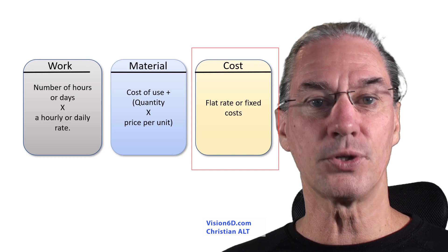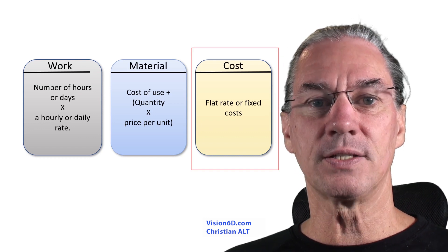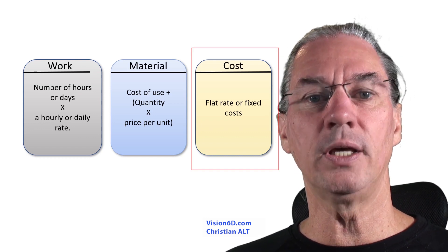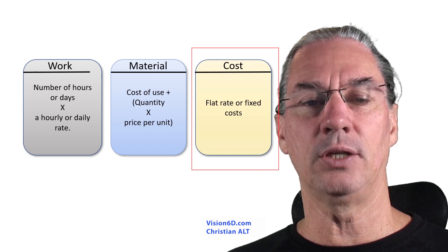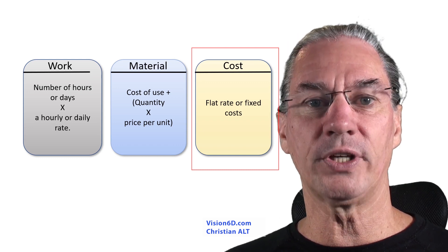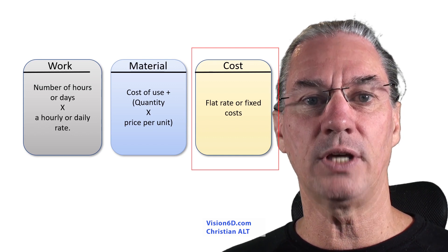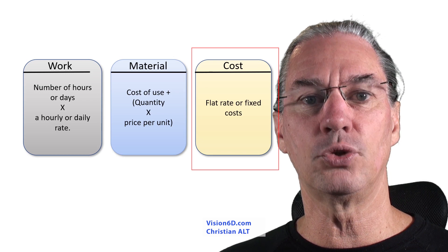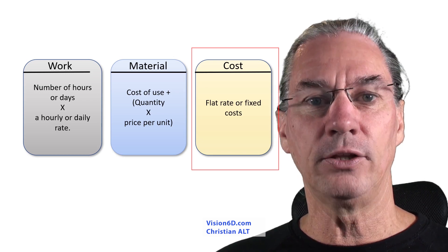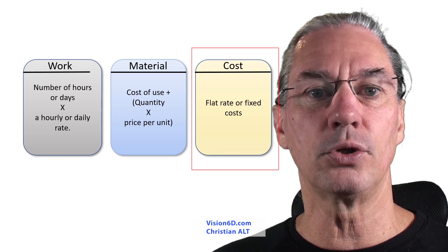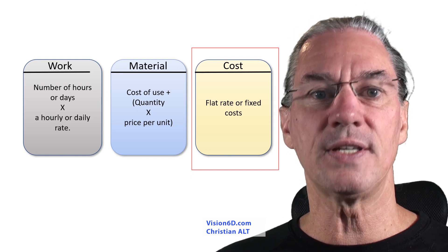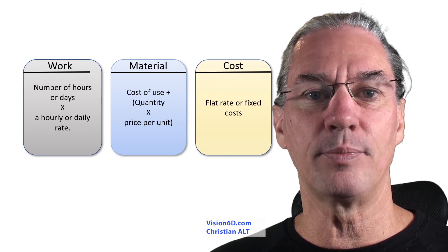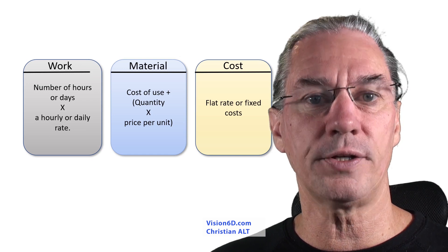The third way is with cost resources. Cost is simply a cost. It can be in a project an insurance or in our case, in the CRM project, it can be the case of the training. For example, we have two days of training and those two days, they will cost us 4,000 euros. So, this is typically shown by a type of resource which is simply cost.